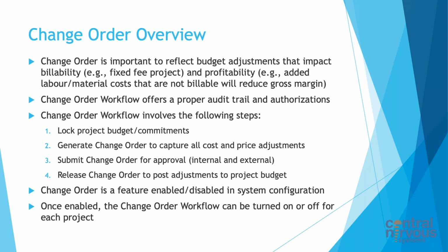So once we have it locked, then we generate change orders and submit them for approval. It's not only external, sending it to the client, but it is also internal. So a discipline lead or a business unit lead reviews something that the project manager may have discussed with them, but now we are capturing that digitally in the system to show that this change has been requested, or that we need to make this adjustment.